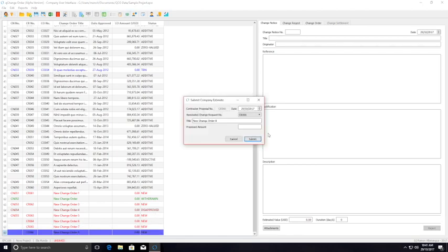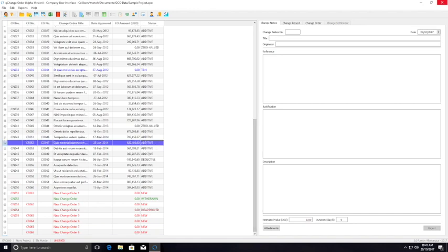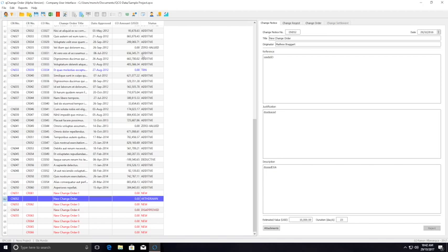And here I bid. I'm a company, but I'm bidding because this is not a competitive bid anymore. We already have a contractor. This is the reason why we're creating this system, because we cannot make any competition anymore, because the contractor was selected during the start of the project. So now it's complete. So let's save it.